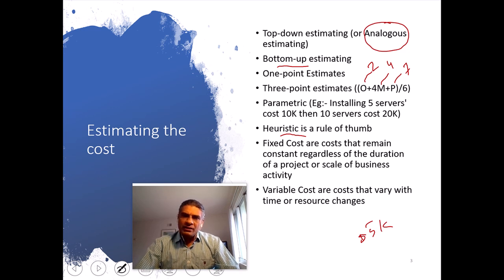There are different other definitions of cost. Of course, some of you are finance oriented. You can find there are fixed cost estimates, where you ask somebody to give a fixed bid, and let's say for cleaning the room after painting is done, it's $200. That's a fixed cost. Variable cost is basically based upon the hourly rate.